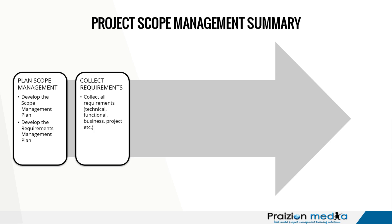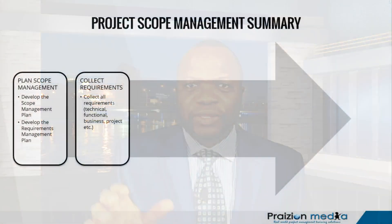A lot of people often get the first process mixed up with the second and the third. Plan Scope Management is planning the how of scoping out the project — planning the how of eliciting requirements. So you get your Scope Management Plan and your Requirements Management Plan. And in the process of Collect Requirements, the plan you focus heavily on is the Requirements Management Plan. This is where you collect all manner of requirements: technical, functional, business, project, and so on.